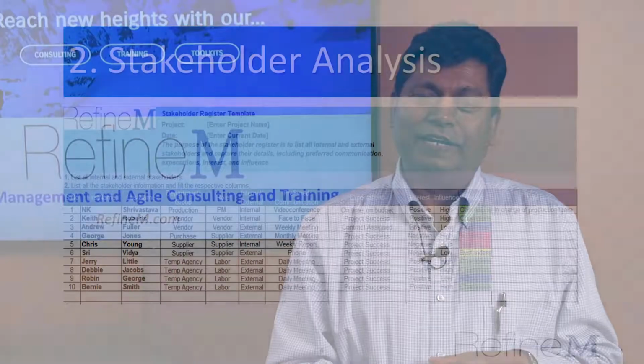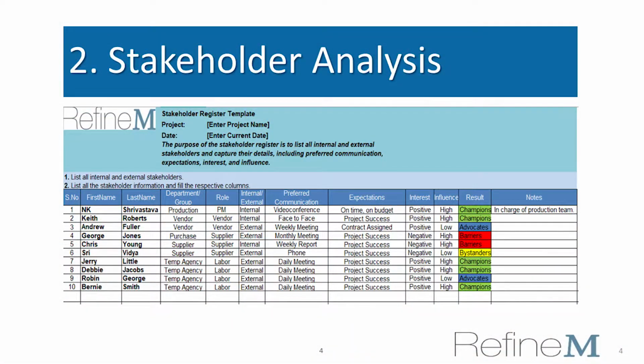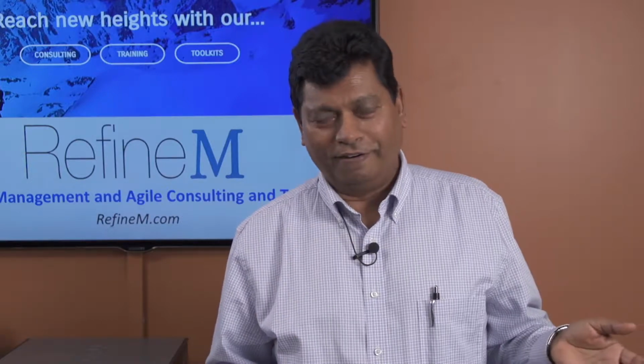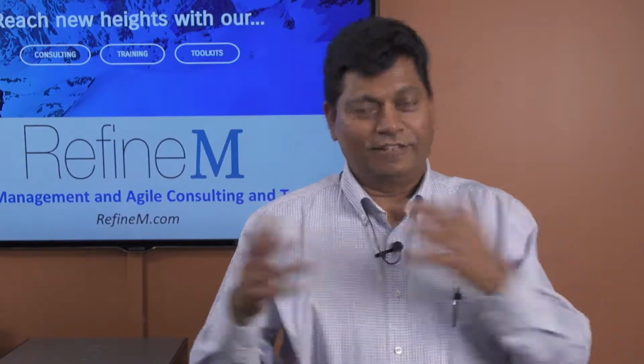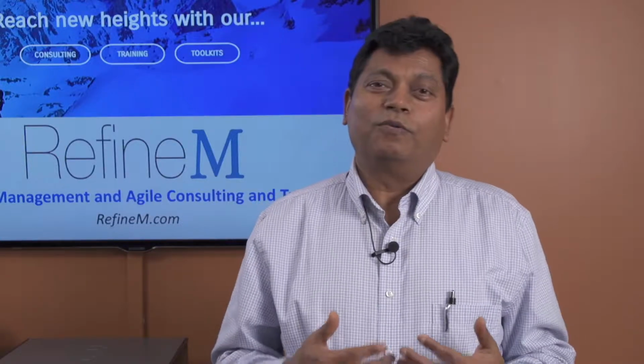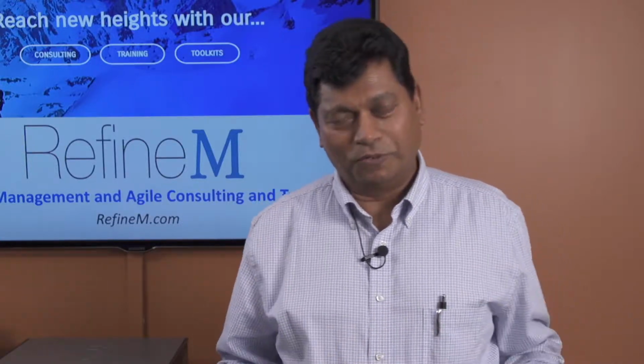Number 2 is having a stakeholder register. Now, what does a stakeholder register consist of? It consists of a list of all the stakeholders, who they are, whether they are internal or external, or part of the team, how much participation they have, what their communication needs are, and what their expectations from the project are.